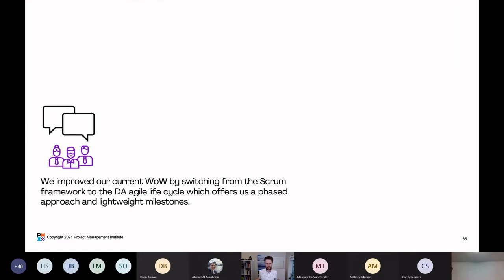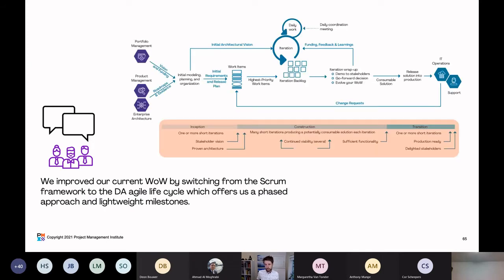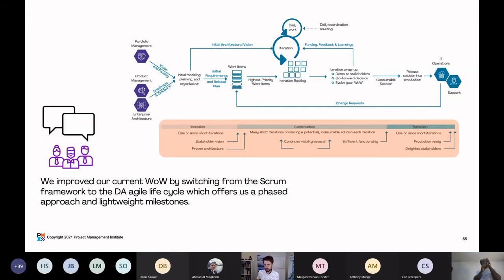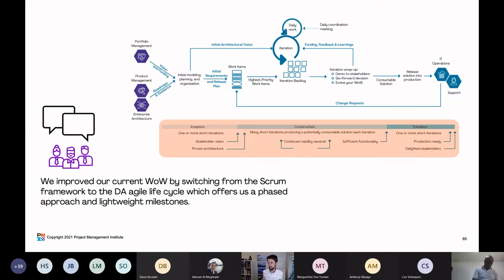The team has improved their current WoW by switching from the Scrum framework to the DA Agile lifecycle, which offers a phased approach and lightweight milestones. The DA Agile lifecycle has phases: an inception phase, a construction phase, and a transition phase — which Scrum doesn't offer. Many Scrum teams I've worked with make up words for these, calling the inception phase 'sprint zero.' But Scrum doesn't have that officially, so they have to make something up.